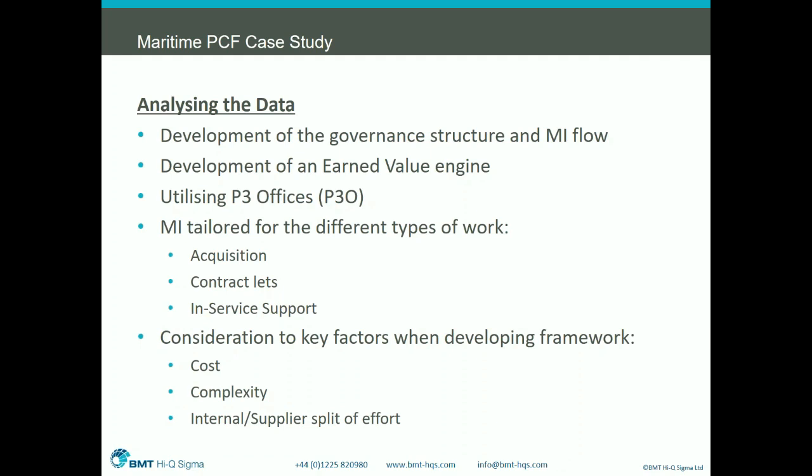To do this, we tried to develop a common program office construct to understand the inputs, outputs, dependencies, the mix of skills and experience within that office required to support the projects producing that MI. We work with the portfolio offices to develop things like integrated master schedules, minimum reporting requirements, and coaching on the types of MI that we should be seeing at these senior levels. Focus was trying to understand the impacts on the portfolio or program rather than individual project outcomes.